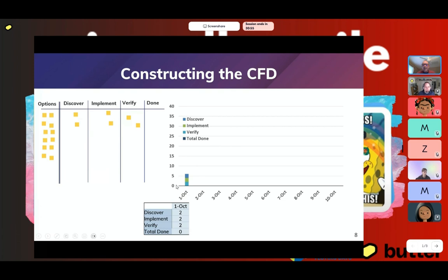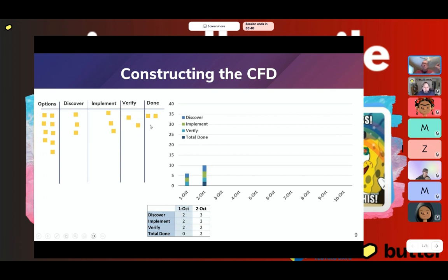If we go to the next day — October 2nd — some things have shifted. We now have three items in discover, three in implement, two in verify, and two in done. As we move our work through our Kanban system, or if we're a scrum team through your system, these items are going to change through this flow. Down below we have a table that simply mimics what you see in the board, and you can see that being reflected in the bar chart.